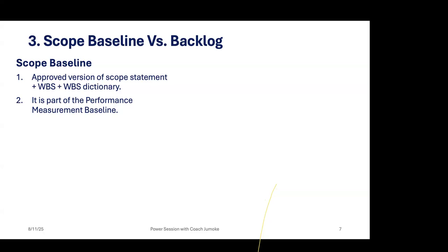So when you get to lesson 5, you are not just performing assessment, you are checking plan against actual. So if you had a project that is 6 months, by the time you get to the 3rd month, what is the unit of work that should have been completed according to your plan? You pick that, and then what you are able to do will be the actual.